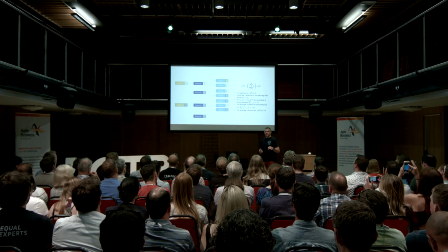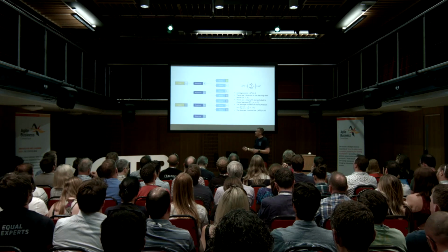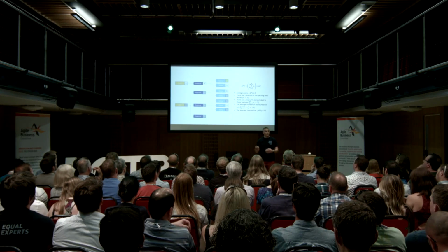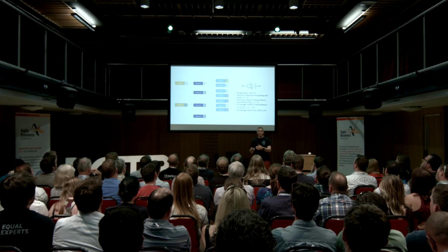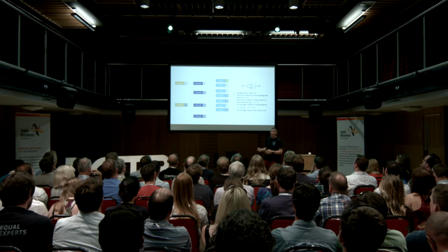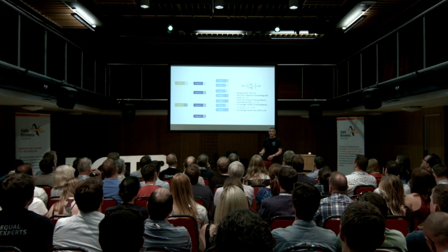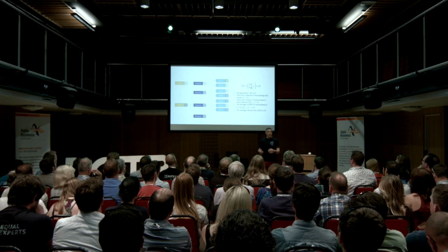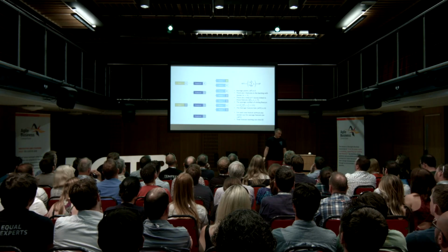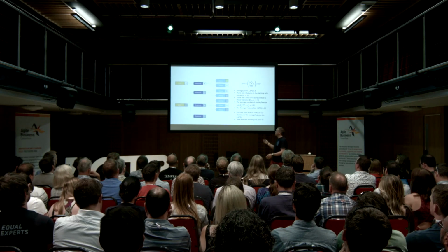The reason we use the number of stories rather than the size is because when we start looking at this in more detail and it comes to the team actually working on them, we're going to have broken that down into stories at that point. So as soon as we start breaking a feature down into stories, then we fall back into these examples where we're counting up the actual number of points for the stories we've got. So if this suddenly becomes bigger and we've got 5 stories, then our averages will update. Okay, so we add this extra feature to our backlog, and we can say it goes up to 43.